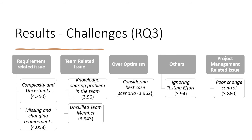For Research Question 3 — what are the reasons for inaccurate estimates in agile software development? — 20 factors were grouped into five categories: requirement-related issues, team-related issues, over-optimism, others, and project management-related issues. The most agreed-upon factors by highest mean value are: complexity and uncertainty under requirement-related issues; knowledge-sharing problems under team-related issues; considering best-case scenarios under over-optimism; ignoring test effort under others; and poor change control under project management. Results show only two significant differences based on respondent experience: poor user stories and poor change control.